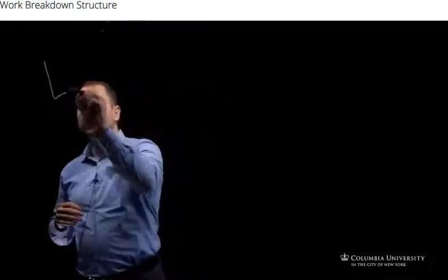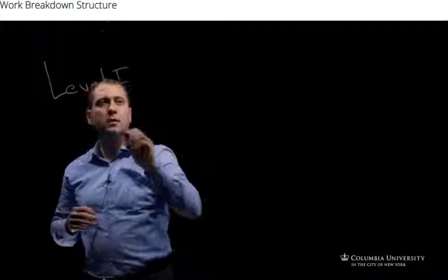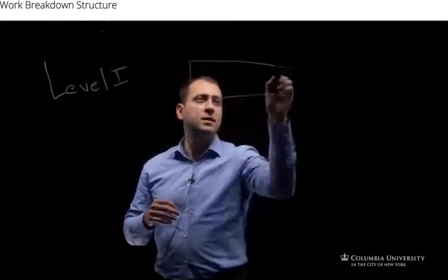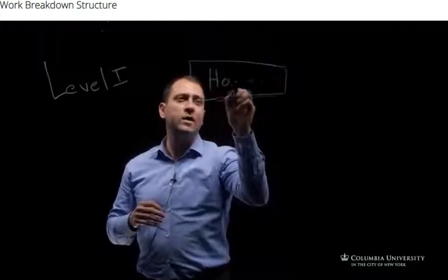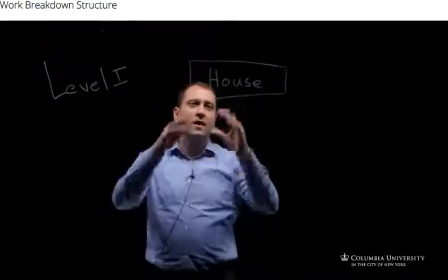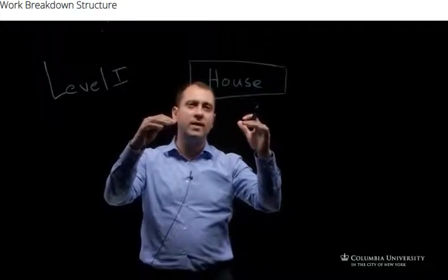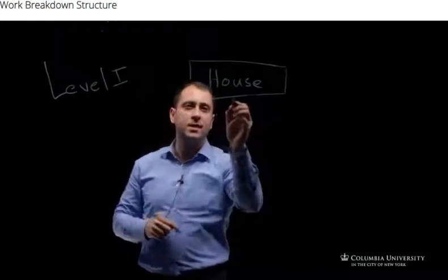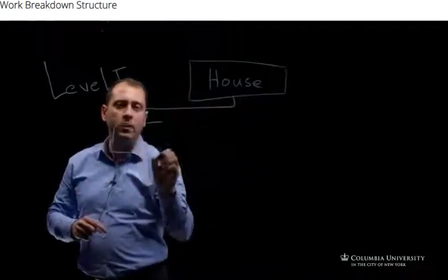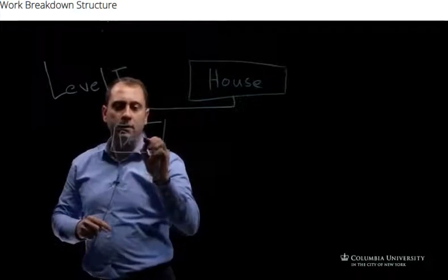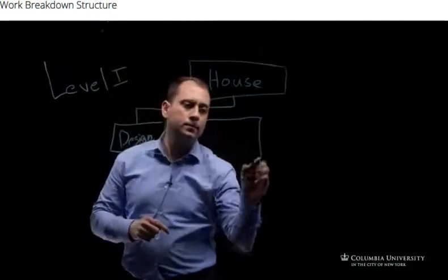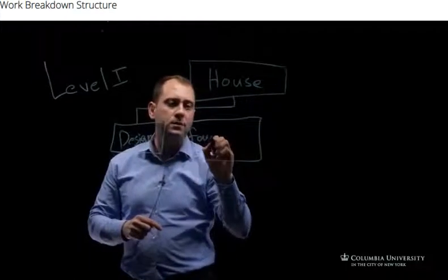Let's start with an example of what is a work breakdown structure. As we said, it is a hierarchy of levels of work packages. So let's say level 1, we have the first work package, which let's say we are building a house. The house then will be divided into the second hierarchy or the second level of the WBS into smaller packages. Let's say we want to focus more on design, foundation,